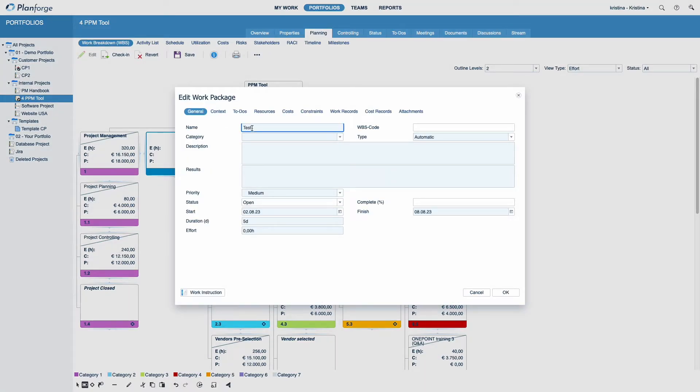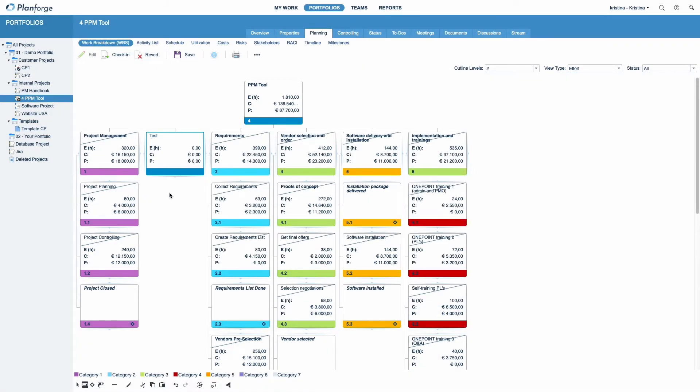The deepest visualized level of your project plan is displayed vertically. All other levels, including the first one, are rendered horizontally.